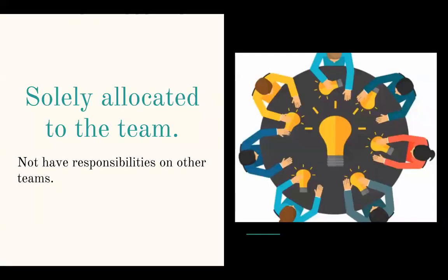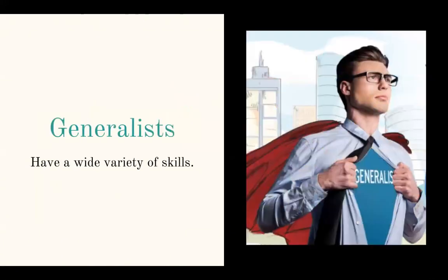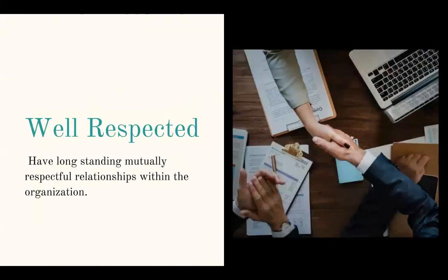So team members should be solely allocated to the team. They should not have responsibilities on other teams. They should be generalists and have a wide variety of skills. They should also be well respected, have long-standing mutually respectful relationships within the organization.